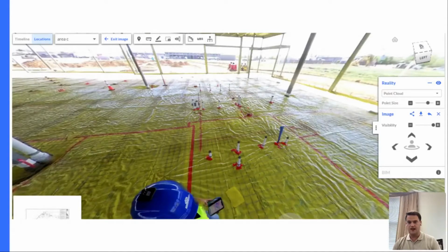So I went back into Reconstruct back to about May of 2021, which was when they were placed. And I got the images and sent them over to the plumbing inspector for Sacramento County, and he actually accepted them based off that. And so that was a huge benefit for us, not only because we got that inspection passed, but also we had poured the concrete for it and had all the inspections for that. So that saved us a ton of money and time right there instead of digging it up.